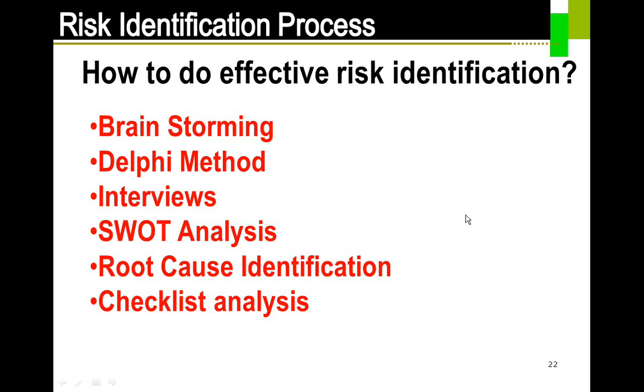Ideally, this is done by sending emails, surveys, or polls, and then they would come back and say, yes, this is the right thing, this is not the right thing. Third thing you can do is interviews. What it means is you would go and speak to the people directly, face to face, and give the scenario. This is the project that I am doing. I would like your inputs on what might go wrong.